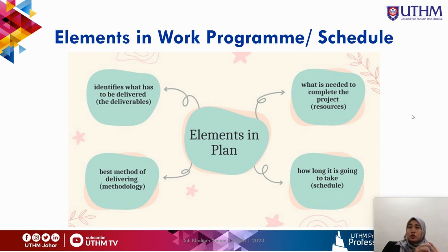Knowing which is the best method to deliver depends on your budget, on the cost of the project program, on the time allocated to complete the contract, and also on the resources that you have. Let's say you are a company that is very expert in the IBS system. Maybe you can use this system because you already have the resources to construct. Unless you don't have the expertise or resources, you can choose another method, or you can outsource the method if the client requires that method for the construction of your project.